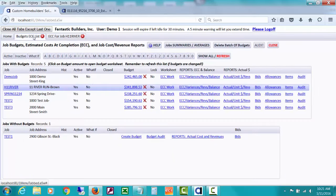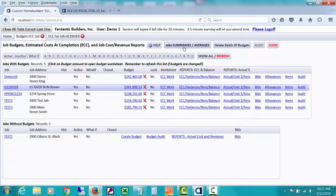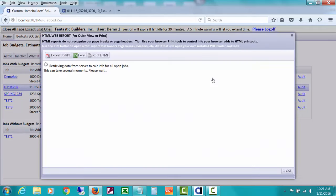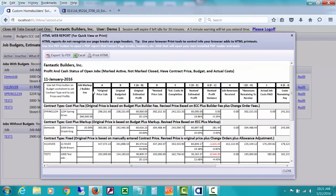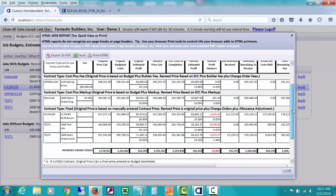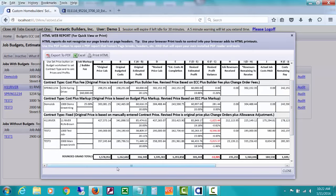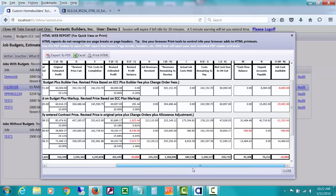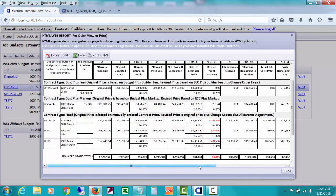One more thing. Back on the list of jobs with budgets, I'd like to show you this job summaries, averages button here and this one report that says profit and cash status of open jobs. And if you remember the last, you'll see that this is a report that groups by cost plus fee, cost plus markup and fixed. And we did just checkmark that one as fixed. And if you pause this and study these columns, you'll see that our revised profit variance is going down on this job a bit. Up on some other jobs. Probably with all my demos, I'm always going down because I start demoing going over budget. The other thing that you can see over here is how much cash you have available, how much has been contributed by the job, how much unpaid accounts payable have been posted as of today and how much cash you have available, which this one is short a bit for paying these unpaid payables.